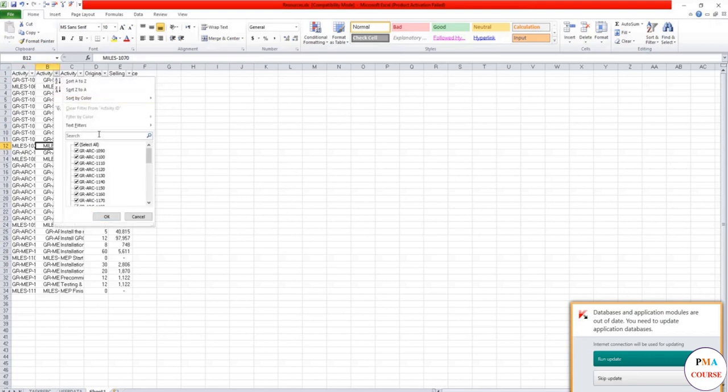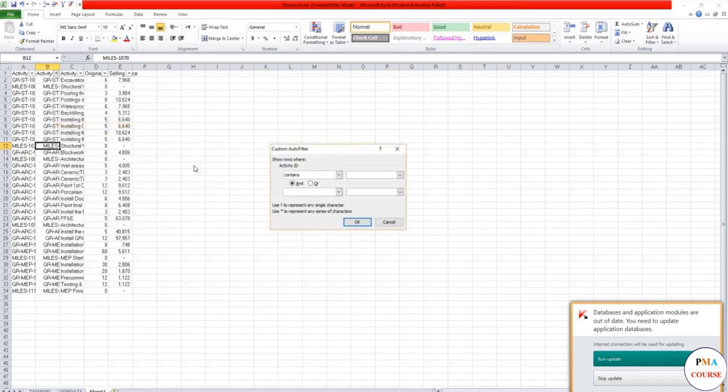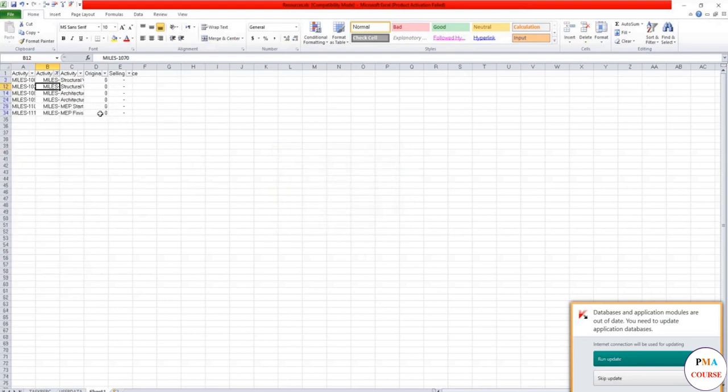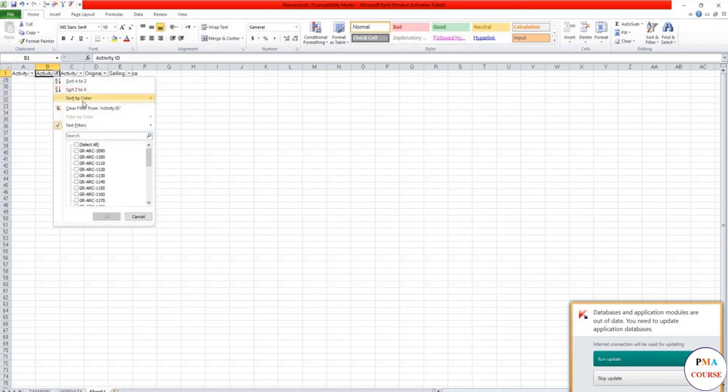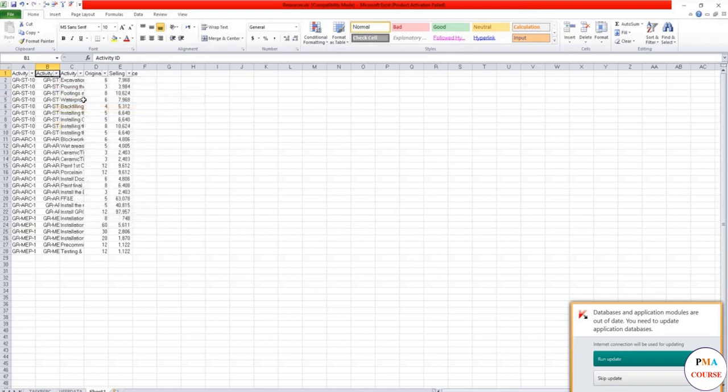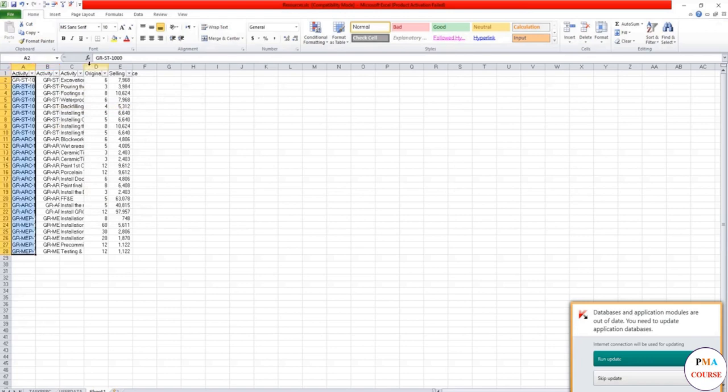So Filter, remove the blanks. Filter using the blanks. This will filter only WBS. No need for them anymore. Remove them. And another thing: now because it's ready, you have the milestones. You can filter another filter. You don't want to add resources to milestones.